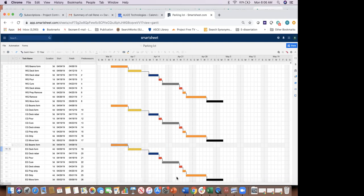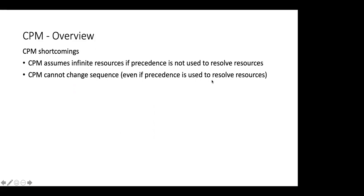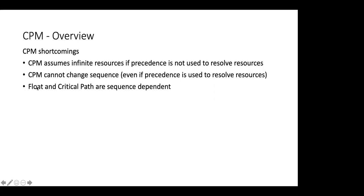You've got a choice: either don't lock yourself in — in which case you're not modeling resources and assuming infinite resources — or you draw those arrows, locking into a static non-dynamic system that cannot do anything useful by itself without you interfering and redrawing, say, 200 arrows out of 6,000 in a typical schedule. Also important: the float and the critical path are sequence-dependent. When you use precedence to resolve resources, you fix a certain sequence, but all your float calculations depend on how you drew those arrows. Any time you want to re-sequence — because it rained or whatever — all your float numbers change.